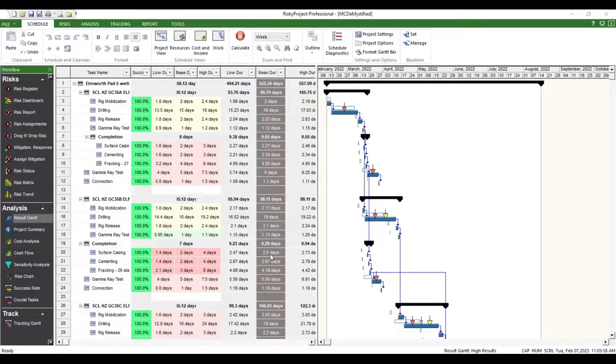If it's a single impact, so you don't have the impact modeled as a distribution, but it's like, if this occurs, it's going to cost me $20 million, then the number of iterations you run will account for that fairly easily within that 1,000 or so. You'll get that impact. But again, judgment call.